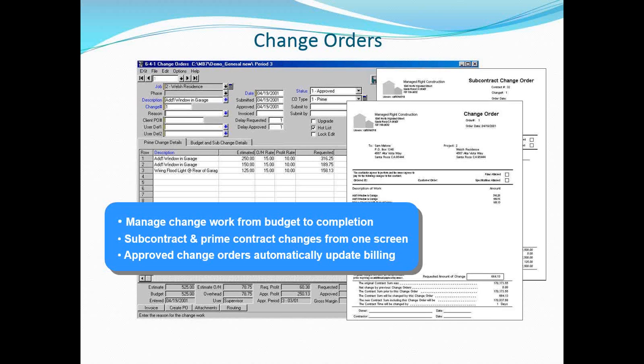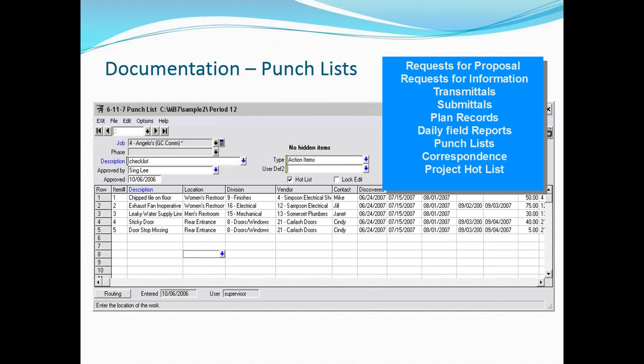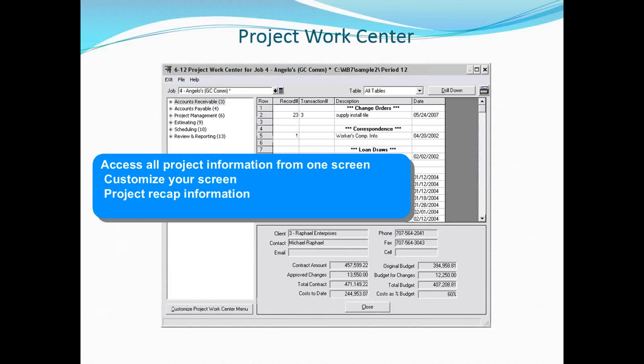And so it helps us stay up to date on those processes a lot quicker. Another function that's really designed just for residential builders, we see some commercial do it, is our punch list management. So if somebody goes out to the home at the very end of construction, looks through it, keeps track of the punch list of what needs to be done, who's going to do it, whether a vendor's going to do it or an internal employee's going to do it, and then tracking to make sure those things are handled, they're closed out, and they're taken care of.